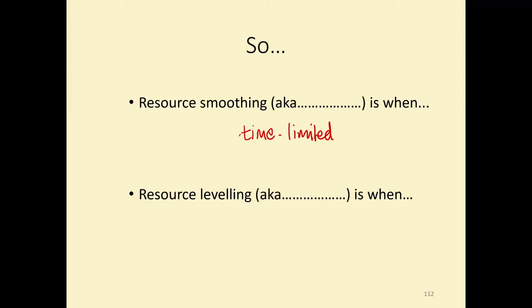Or another one is to bring in additional people from other parts of the organization. We have to do whatever we need to deliver the thing on time. And a classic example, I think I suggested with this was something like the Olympics. That would be time limited scheduling. Those Olympics would have to occur at that time.